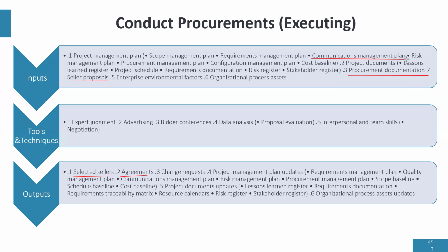Are you going to provide them a number, an email address, or a link where they can send messages to us? It's very important in procurement. Something that's also important is cost baseline. Cost baseline is the project sum. You cannot award a contract above your budget.